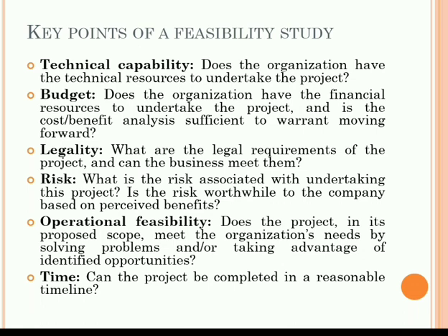The study must also determine the returns on investment, whether it's measured as a financial gain or a benefit to society, as in the case of non-profit. In some cases, a feasibility study might include a significant change in how a business operates, such as an acquisition of a competitor. As a result, the feasibility study might include a cash flow analysis measuring the level of cash that is generated from the revenue versus the project operation cost. Here, a risk assessment must also be completed to determine whether the return is enough to offset the level of risk of undergoing the venture.